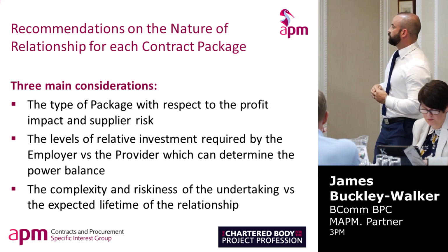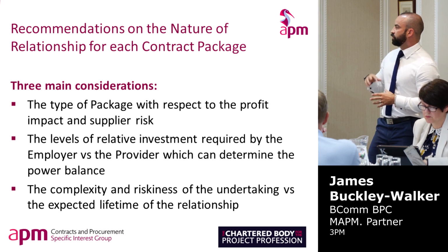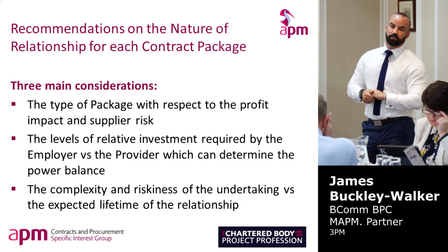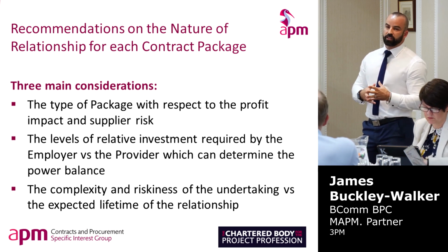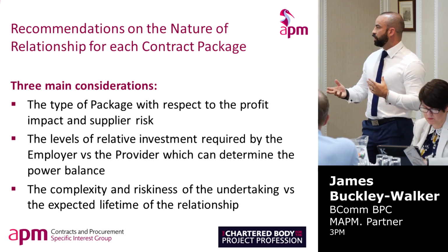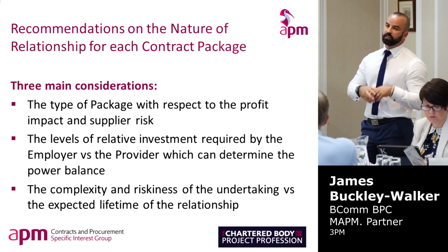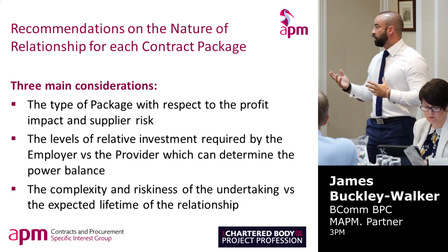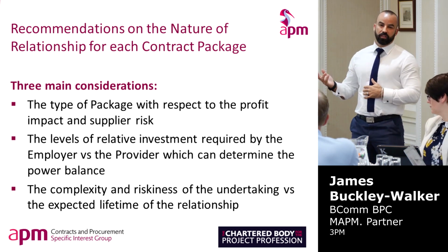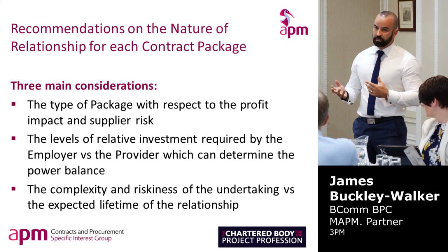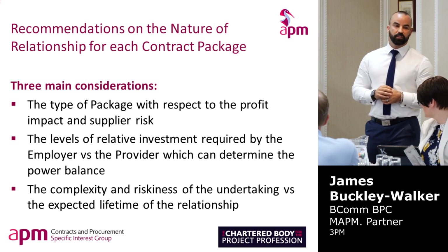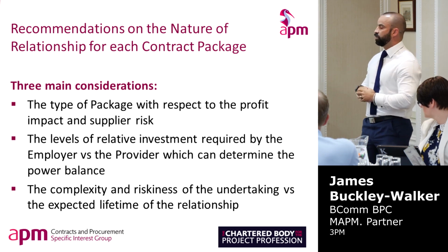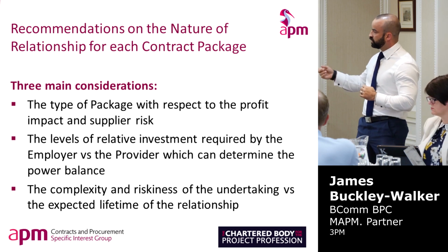So the first two, in respect of the profit impact versus the risk, and the relative investment versus the risk. So at one end, if it's low profit impact, low risk, then it's going to be a transactional one. If it's something that's high impact and high risk, high cost, like a building lift, for example, where you've only got a small number of suppliers, then you're going to look for a more strategic relationship. The last point is the complexity and riskiness of that over the lifetime of the relationship. So if you just skip on to the next one.